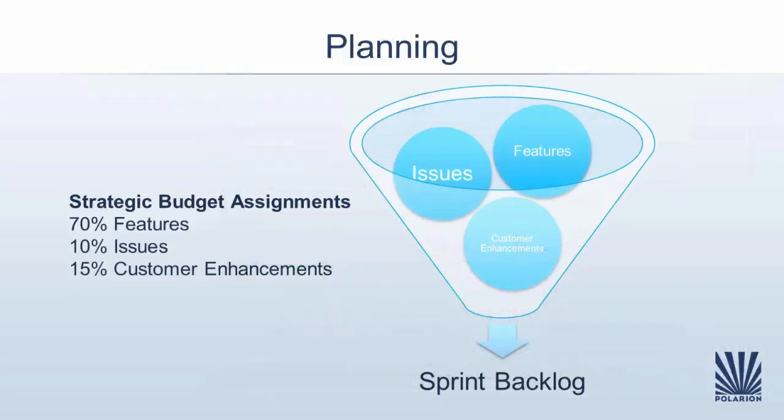Peter had a pretty clear vision of how much he wanted to spend on different activities. So even though he was not able to order them in one single sequence, he was able to decide how much business value each of the value streams brings. It means how much time the team should spend on the activities.